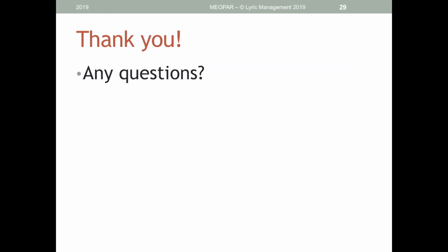So this is a part of the documentation, but it also allows for, if expectations are not being met at some point later on in the project, somebody says, actually, that's not what I wanted, having a point of reference to say, well, when we talked about this 6 months ago, this is what I wrote out that we said we were going to do, and I gave it to you to review, and that seemed right. It's not about pointing blame, but it is about what's changed between when we talked 6 months ago and now, so that we can revise what those expectations are and see if it's possible to incorporate those within the project plan.